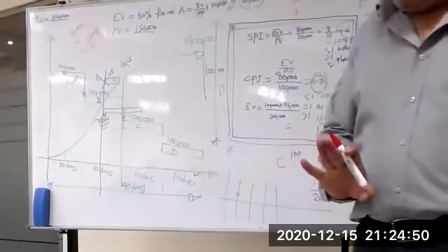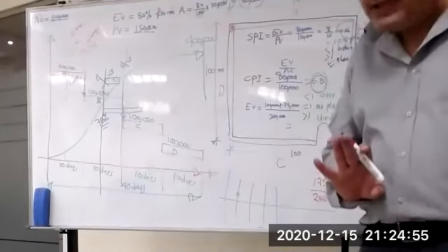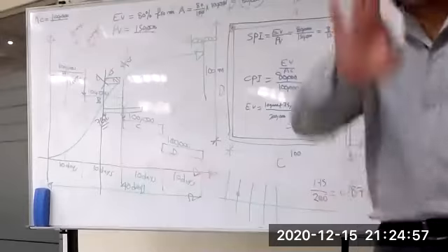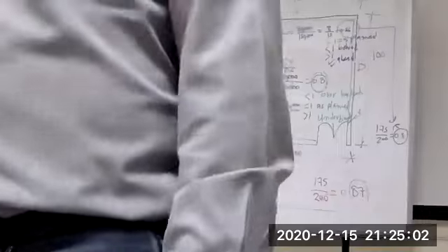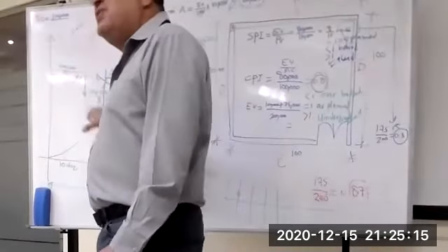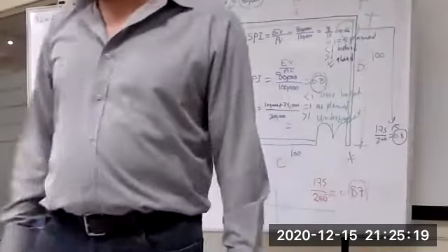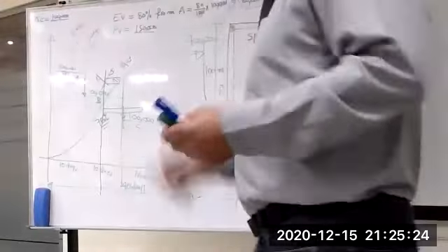0.87 means what? You are still over budget, but your trend is going up, getting near to 1. I am happy a little bit. Take another corrective action, preventive action, and monitor. See the root cause, whatever had been done wrong, and take action. Every day you have to monitor this type of project because this is a 40 days project, not even every 5 days. But this is how to control. This is the way of cost control.